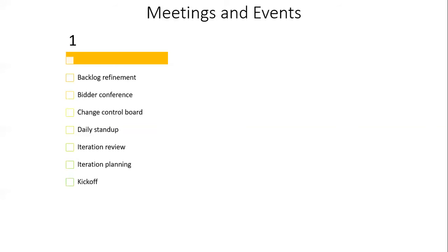The next one is kickoff. We all know this one, hopefully. It's a meeting where we gather team members and other key stakeholders at the beginning of a project to formally set expectations. Now, depending on the size of the project, this may take place after initiating, or it may take place after planning. Quoting from the PMBOK Guide 6th edition, the kickoff meeting on small projects occurs shortly after initiating. On large projects, the kickoff meeting takes place after planning within the executing process group processes. Let's move on to the next one.